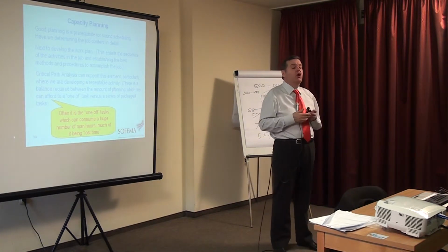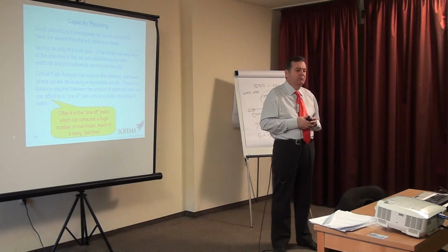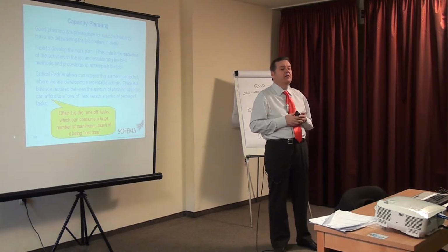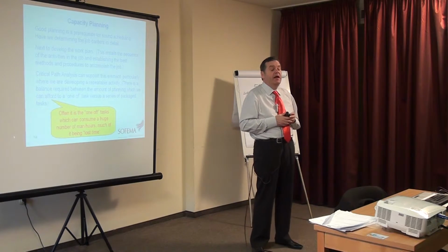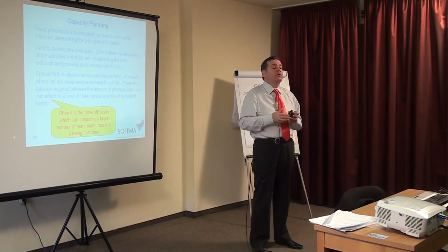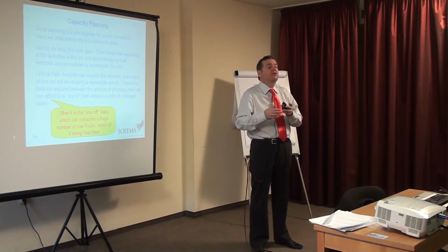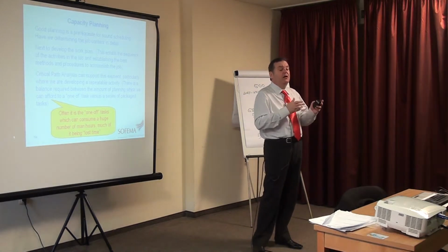Can we work on the engine and the cabin at the same time? Yes. We can work on the engine and the cabin. So they're not on the critical timeline. And so as we go through the processes, activities that are on the critical timeline have to be accomplished.